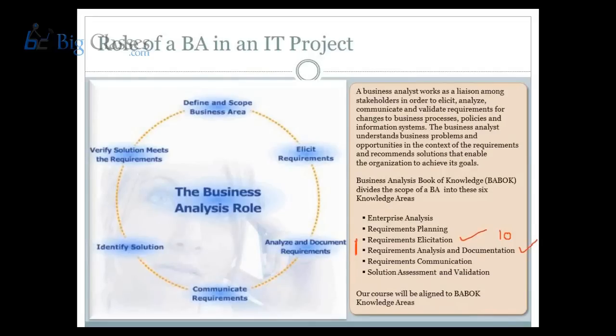Now, before you get into actually the requirements, there would be a planning phase wherein the project manager would create an end-to-end project plan. Obviously, the project manager won't have a good understanding about each and every task that needs to be done. So he obviously depends on the leads. As a business analyst, you would provide details on the requirements. As a QA guy or a technical lead, those leads would provide for their respective areas. So while the project manager owns the end-to-end responsibility and consolidates and prepares an integrated plan, you provide the inputs for your requirements plan.